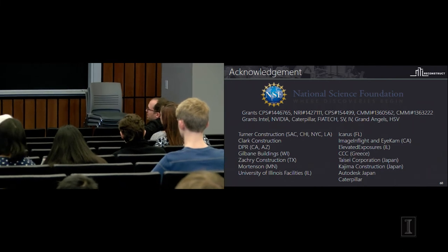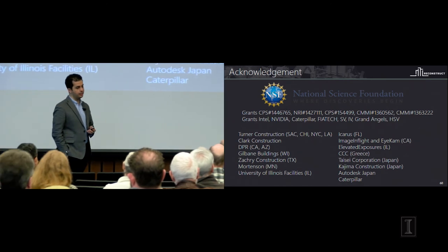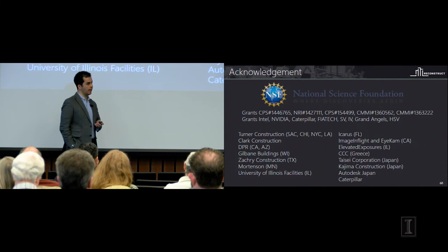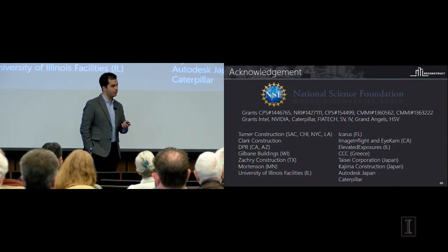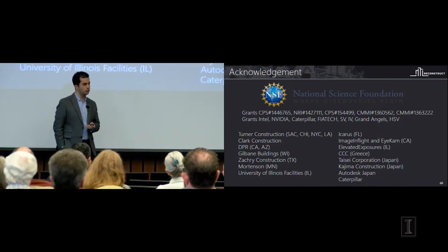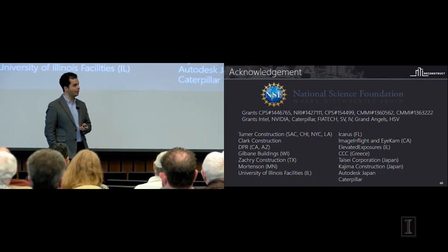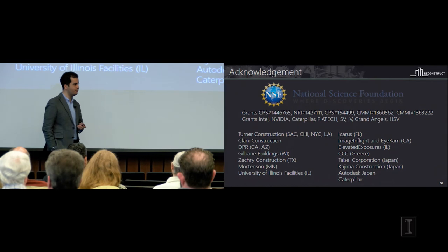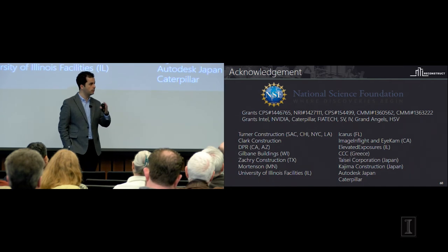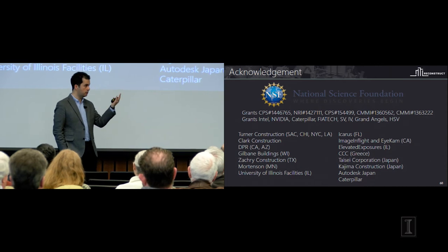That's an excellent question. There are three pieces to the analysis of the data. One piece is the data capture process when it comes to operating a drone. GPS still happens to be a technology that is unreliable in certain cases for us. The other aspect is when we are operating close to steel structures, the magnetometers on this platform also get affected. So sometimes drone operations happen to be manual. Anyway, given the FAA regulations, we still need to have somebody standing and keeping the line of sight. So we're using somebody's time to manage the drone operation. Sometimes we have to switch back to a completely manual operation, and we get the data out of it.